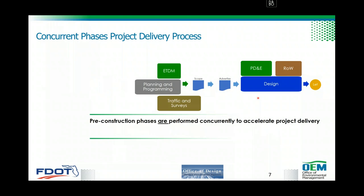If you look at this traditional process, all phases are completed in series. What we realize is that there are some PD&E activities that are repeated during design, and some that should have been done in planning — so there is repetition in this process. The concurrent process moves PD&E and combines it with design, doing both PD&E study and design services together. We use information from planning and ETDM screening to scope the project, then advertise and procure one consultant to do both PD&E and design. After PD&E is approved, the right-of-way phase starts.